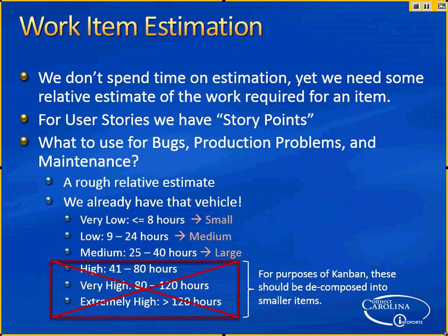You could build the online screens, and then within the guts of it, put in whatever else, and then add the final piece last. If it divides up like that, that would be good, because that's sort of a Scrum thing, and it has the benefit of that Scrum thing. You get validation points way before you're off the rails. So you can kind of meld those.